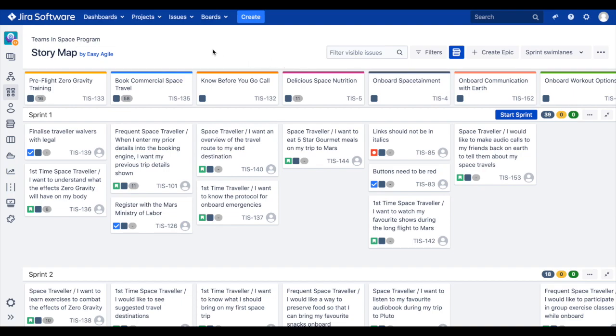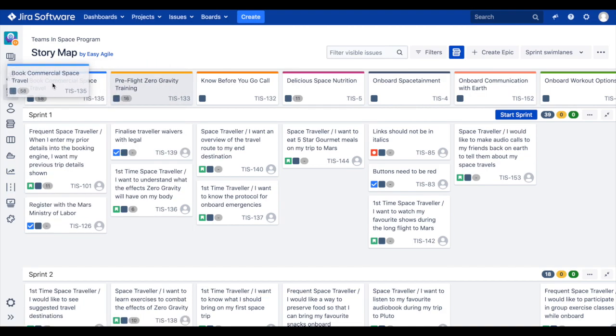As we learned in part one of this series, these epics should appear chronologically in the way our chosen persona would go through our product to achieve their objectives. These epics can be dragged and dropped to update their order in the backbone, and the order of the epics will be updated and reflected on the backlog using JIRA ranking.